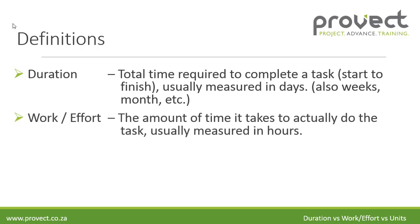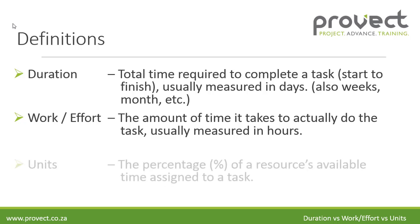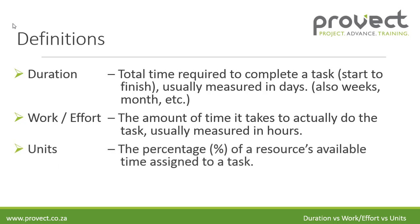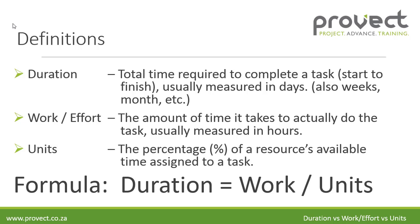Work, or effort, is the amount of time it takes to actually do the task, and it is usually measured in hours. Units is the percentage of a resource's available time assigned to a task. The formula used in project scheduling is: duration equals work divided by units.